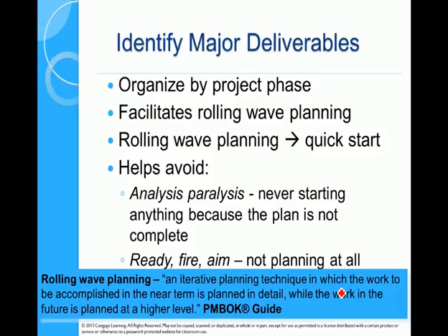It's the foundations, we need to clear the land, we need to do the plumbing and the electricity that needs to go underneath the foundations. We then need to concrete those foundations. Once all those things are done, we say we have foundations, but there were a number of jobs or a number of packages delivered to get us there.